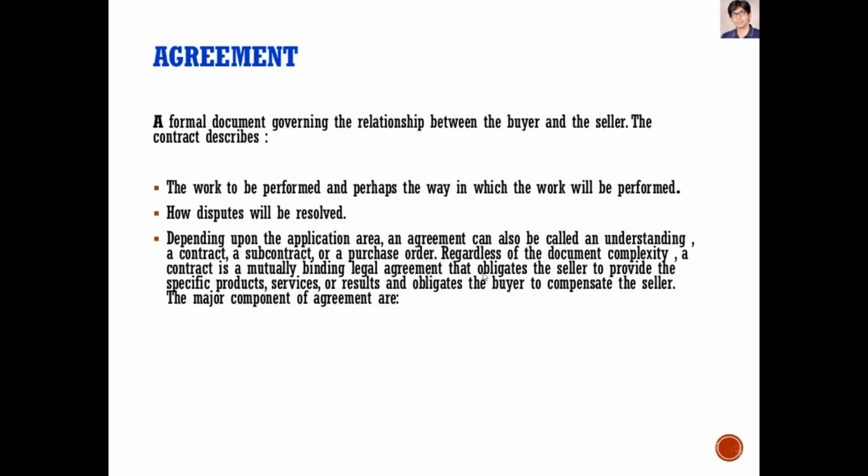Once you decide and you pick a vendor and you've gone through a vetted process, then you have to come up with that actual document. And that document's going to have a lot of details in it. One of them quite often is how any issues are resolved. A lot of times we say we're going to base that on arbitration rather than court, so you waive the right to go to court by signing that contract. One of them you'll see a lot.